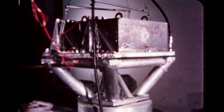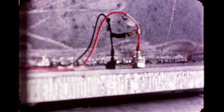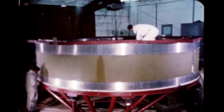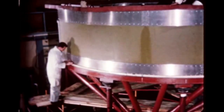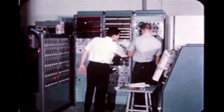Vibration testing for evaluation of instrument unit cold plates manufactured by 4 vendors, Avco, North American, Solar Aircraft, and Aranca, continued at MSFC during this period. Vendor selection will be made following completion of evaluation testing. Manufacture of the instrument unit to be used for vibration testing is now complete. The unit was shipped November 30th to the test site at Wiley Laboratories, Huntsville, Alabama. Preparation of test facilities is continuing, and vibration testing is scheduled to start next quarter.